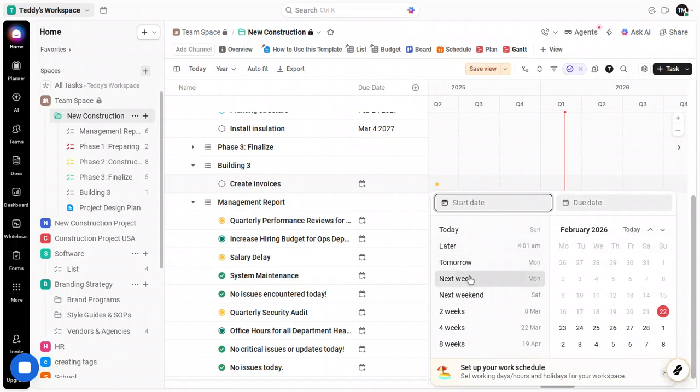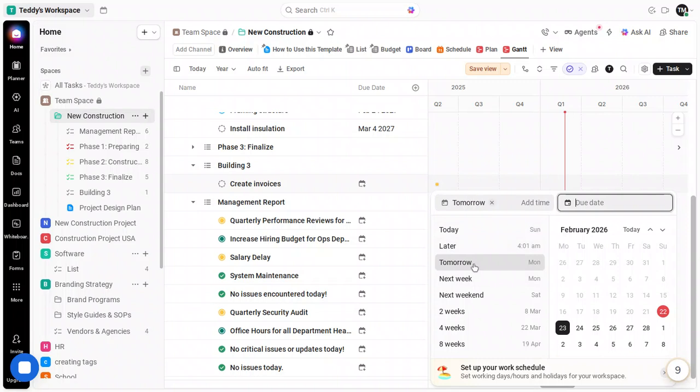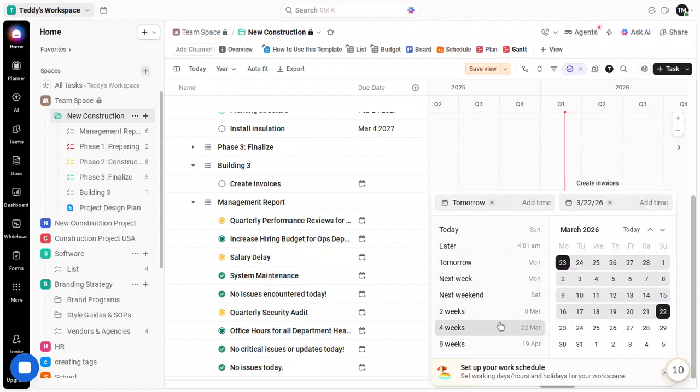If you come across a task with no dates, click the prompt that indicates dates aren't set. Assign a start next week with a single click, and choose a duration such as 2 weeks to block the right amount of time. If needed, confirm the same duration again to ensure everything locks into place. As plans evolve, edit any delays or buffers to keep your schedule realistic. A small adjustment here can prevent bigger problems later.